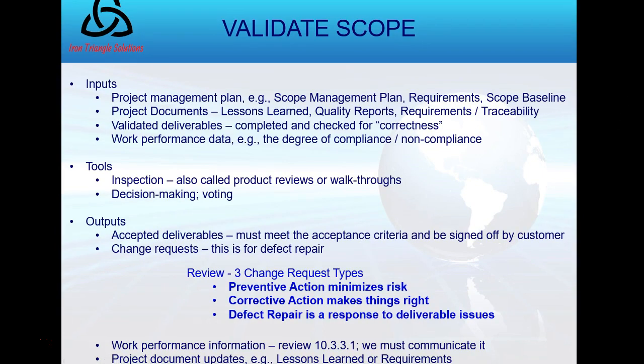I also have an output is work performance information. So I had data as an input, raw data, and now I've analyzed it, and that's information as an output. And that can be used to go to change control next if there are change requests, and then document updates.